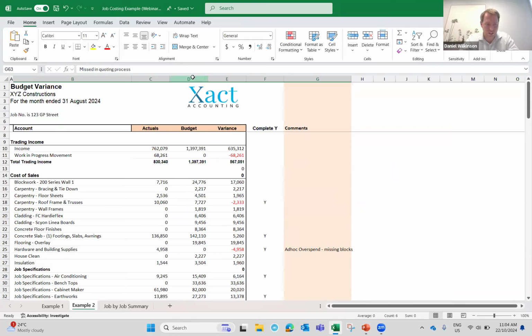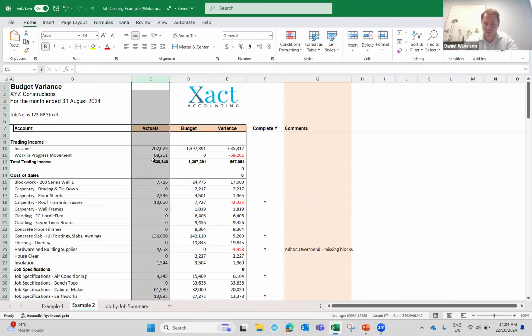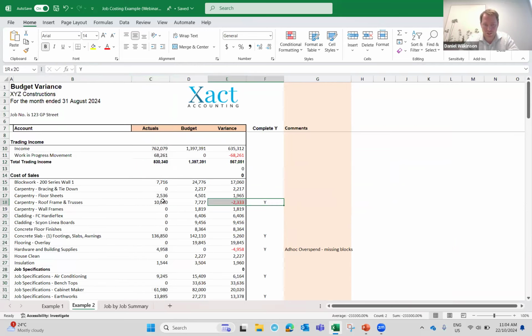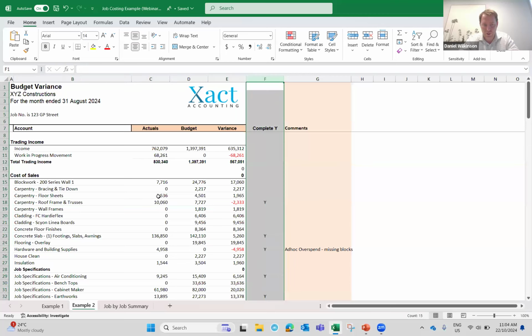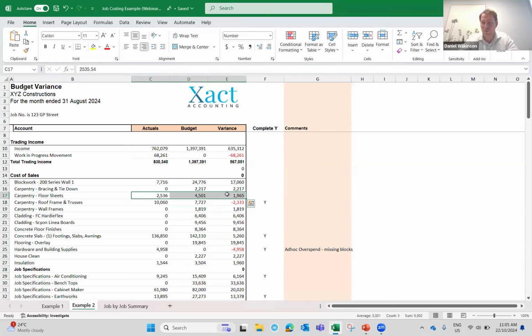So we have a budget that's loaded into Xero. Here, the actuals are coming in each month, and we run through a process and go, well, for carpentry, roof frame and trusses, is this item closed out? So his contract admin closes this out for me, because some of these costs that are rolling in here, I don't know where the bottom is. I don't know whether there's more to come, less to come, more cost, less, halfway through, deposit, don't know. In which case, if we aren't at the end, I couldn't care unless there's serious wobble coming through.